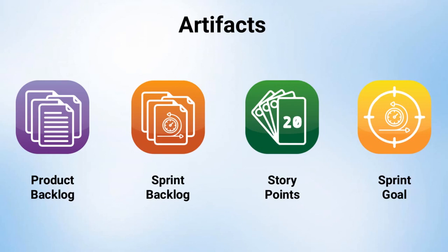There are 2 major reasons to have a sprint goal. The first is that it provides a coherence to the product increment. This means that the features are related so that the product increment is valuable rather than building a collection of unrelated features. This also results in the Scrum team working together to achieve the sprint goal.